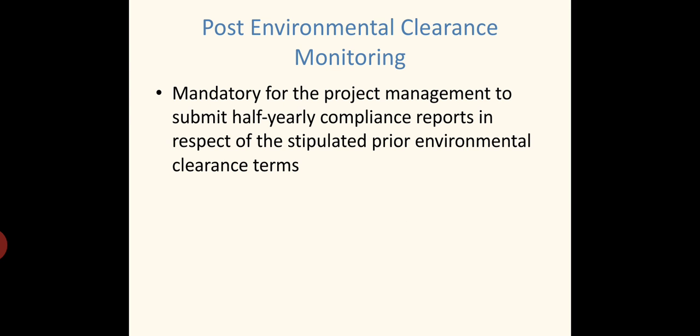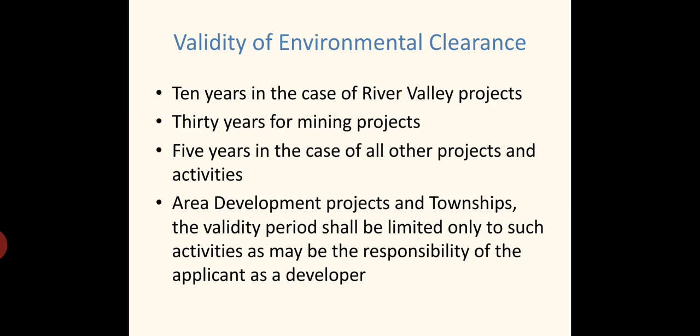Okay. Now, post environmental clearance monitoring. Once the clearance is obtained, what is to be done in post environmental clearance monitoring? It is mandatory for the project management to submit half yearly compliance reports with respect to the stipulated prior environmental clearance terms. Once the permission is granted, as I have already told, if it is for 10 years, they